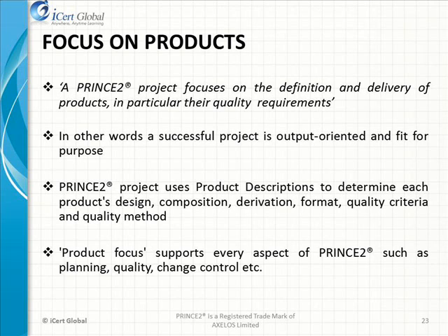Each work package is defined by one or more deliverable products, preferably with tolerances to time, cost, scope and quality quantified in advance. Even management activities such as stage planning are defined by their final output, such as a physical report containing the new stage plan. This allows all parties to clearly specify what is required, and to allocate responsibility for delivering and controlling it.